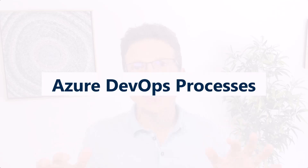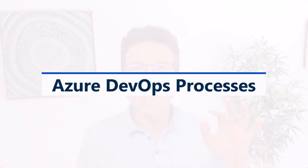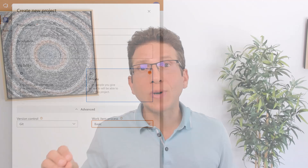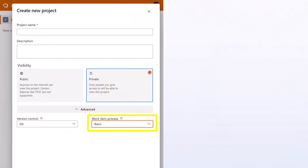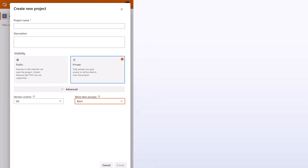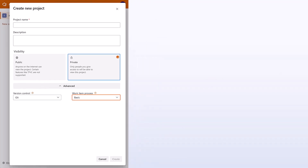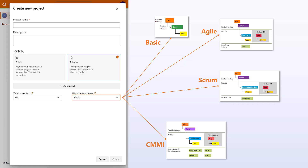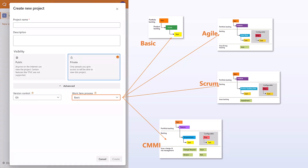Something else to be mindful of: in Azure DevOps, the work item types you get with your project — epics, features, user stories, and so forth — are related to the process you choose when you start a new project. When you start a new project, you can pick from four different processes, as you can see on the screen: Basic, Agile, Scrum, and CMMI.